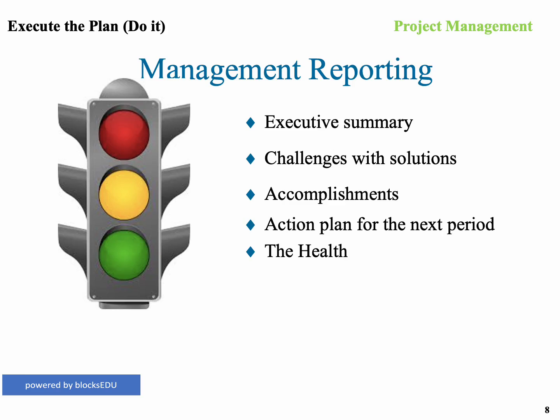So often we as project managers have to report on a regular basis to management. And management usually likes to have an executive summary, so that's sort of an overview of how the project's going. And if we do have challenges, or we have problems or issues, don't just state the challenge or the problem or the issue, but state it with a solution to that. Tell management about what our accomplishments are, and then tell them about what the action plan is, and give them the overall health of the project.